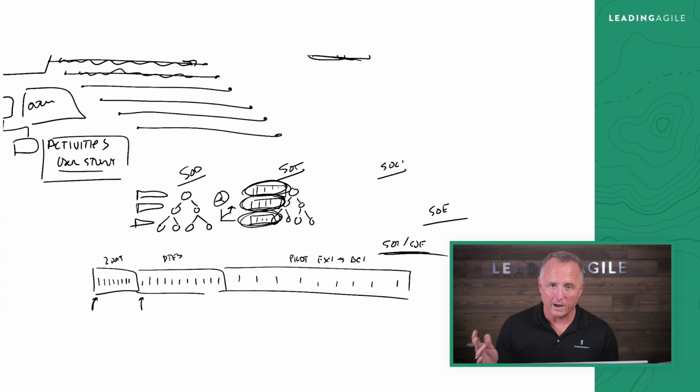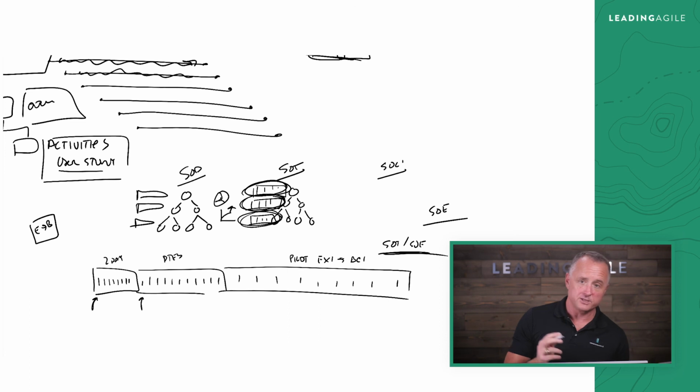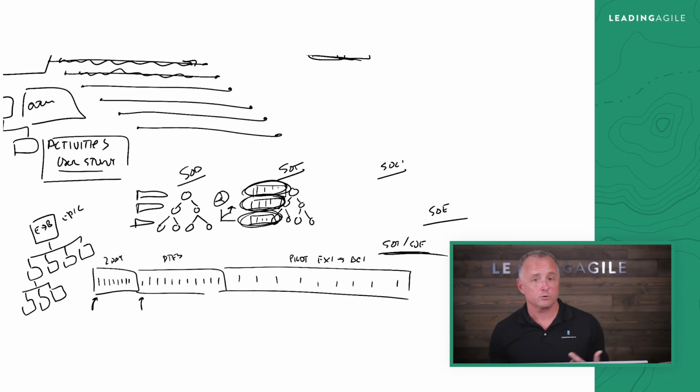when you think about it this way, the idea is that in a transformation, the expedition moving to the base camp is the unit of value, and that's like an epic. Then that decomposes into outcomes, which are measurable and which the business cares about. Those outcomes decompose into the coaching activities that we hypothesize are going to deliver that outcome. And then we start to think about moving those units of value through Kanban or Scrum type queues with their own measures of performance, their own completion metrics, and acceptance criteria. Did it actually achieve the outcome that we wanted? How do we prove it, right? All that kind of stuff.